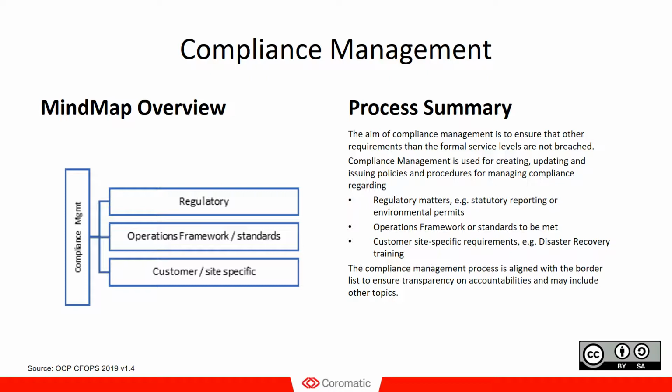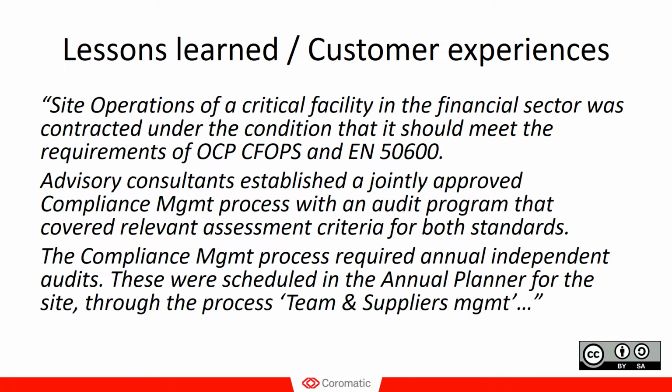And that means that even though it may be delegated to the site management function or the maintenance service provider for the power distribution to actually execute the work and make sure that it happens, by the end of the day, the accountability to have the report created and handed into the authorities cannot be delegated, because that is already regulated in the norms that lies with the site owner. So that's an important part to consider where the border list is concerned on how to manage that from a compliance perspective. Let's look at some customer experience on this.